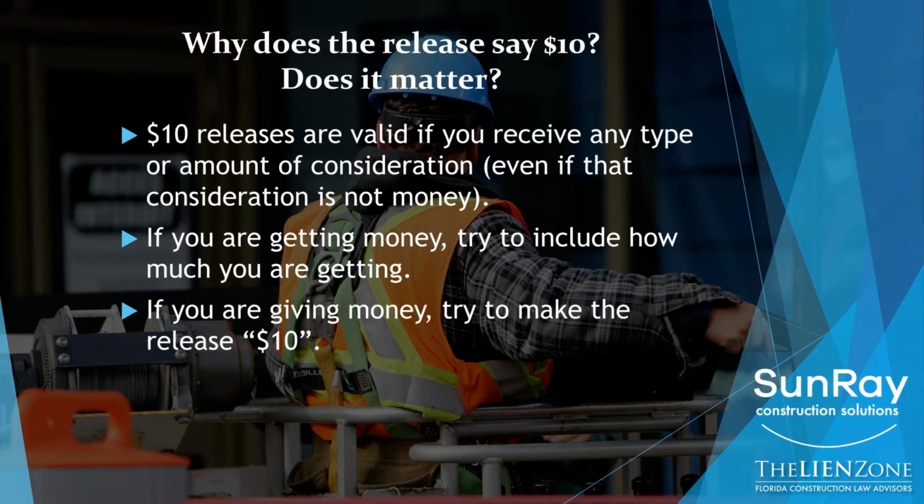If you're getting money, however, right, if I'm a sub and I'm expecting a check from the contractor, let's say it's $25,000, I would like my release to say $25,000, not $10. If I'm a contractor, right, if I'm giving money and getting a release, I would always like it to say $10.